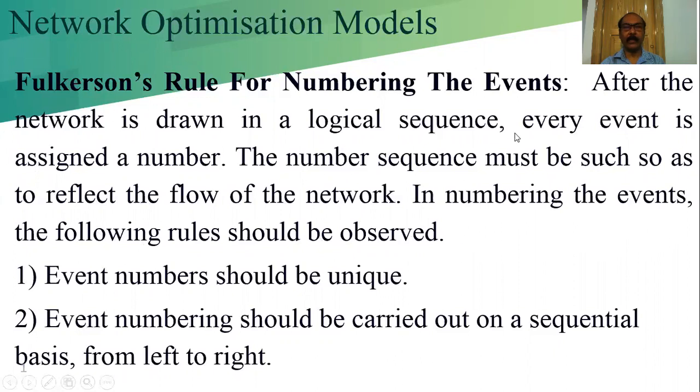When we are numbering the events in a network diagram, the pictorial representation of a project, we follow some rules. Event number should be unique.